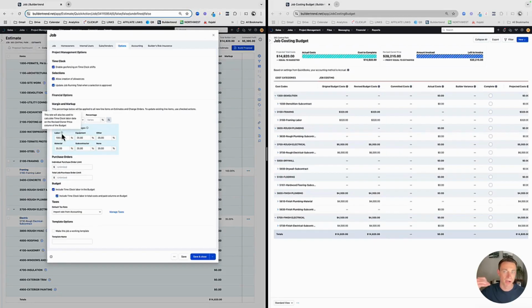specifically for me, because we are typically billing our labor at a higher markup. We're going to bill our labor, our carpenters, at $70 an hour, $80 an hour. They cost maybe $35, $40. So we're marking them up about 100%. And that's standard for the industry. We're taking on the risk of having an employee and having healthcare and all that stuff. And for that risk and resource allocation, we are going to charge a little bit more for it. Okay, so that's kind of standard. Then everything else we do, whether it's materials, equipment, subs, whatever, is going to get that 35%.